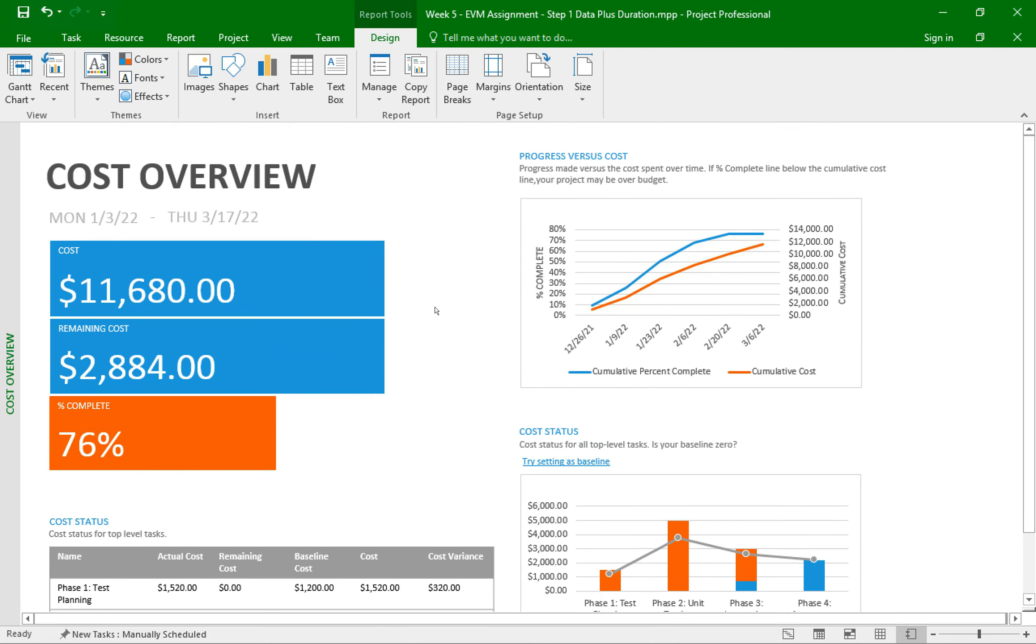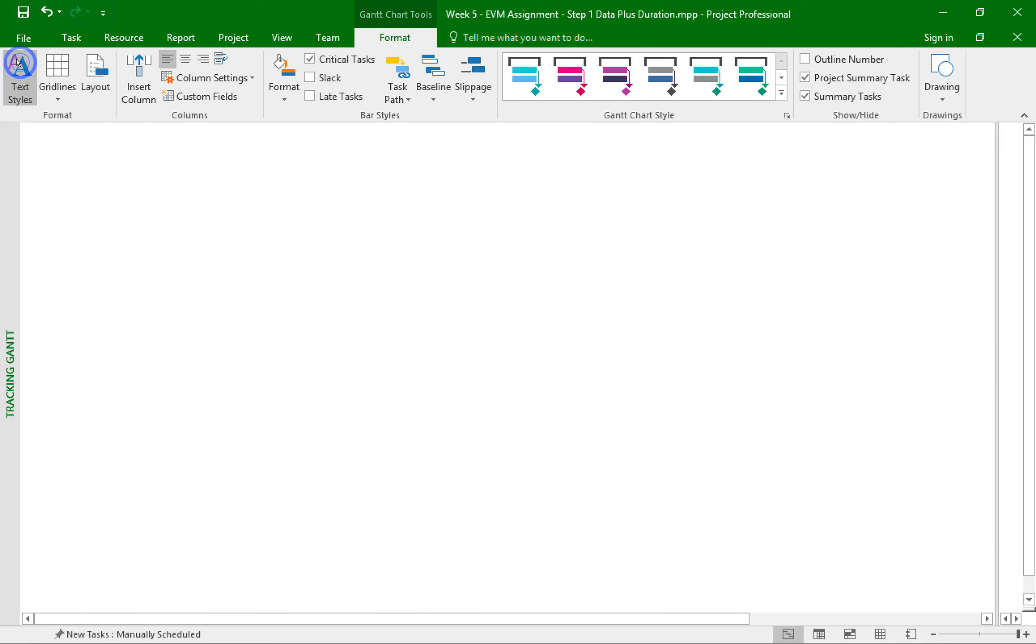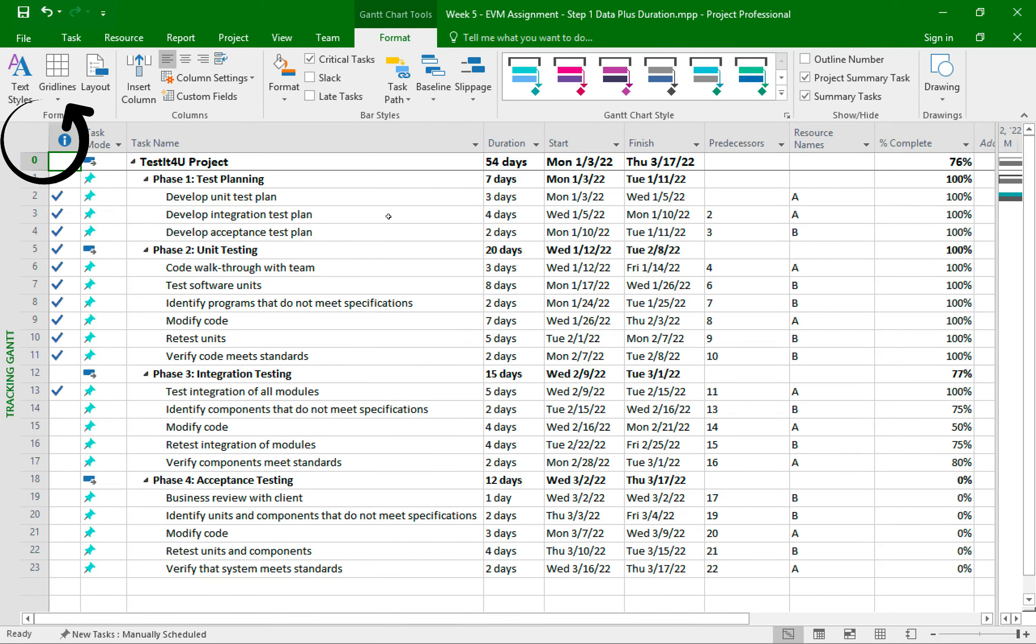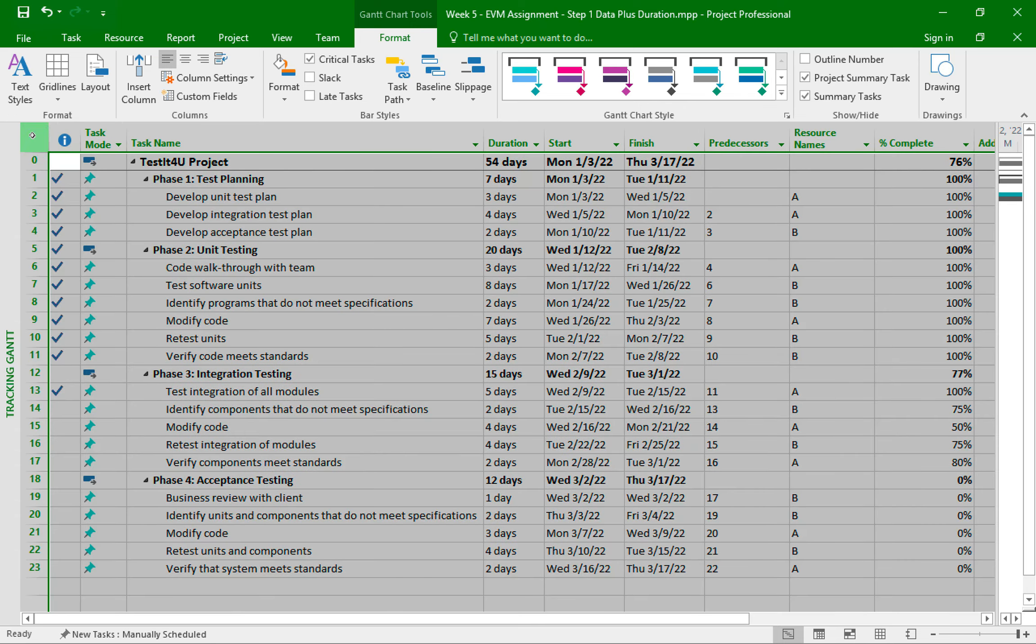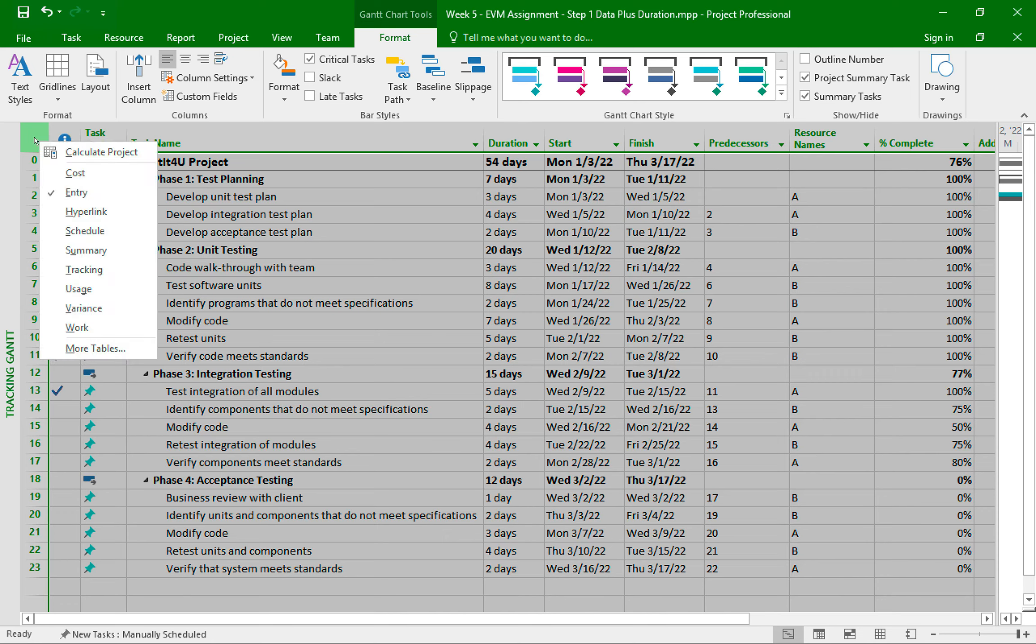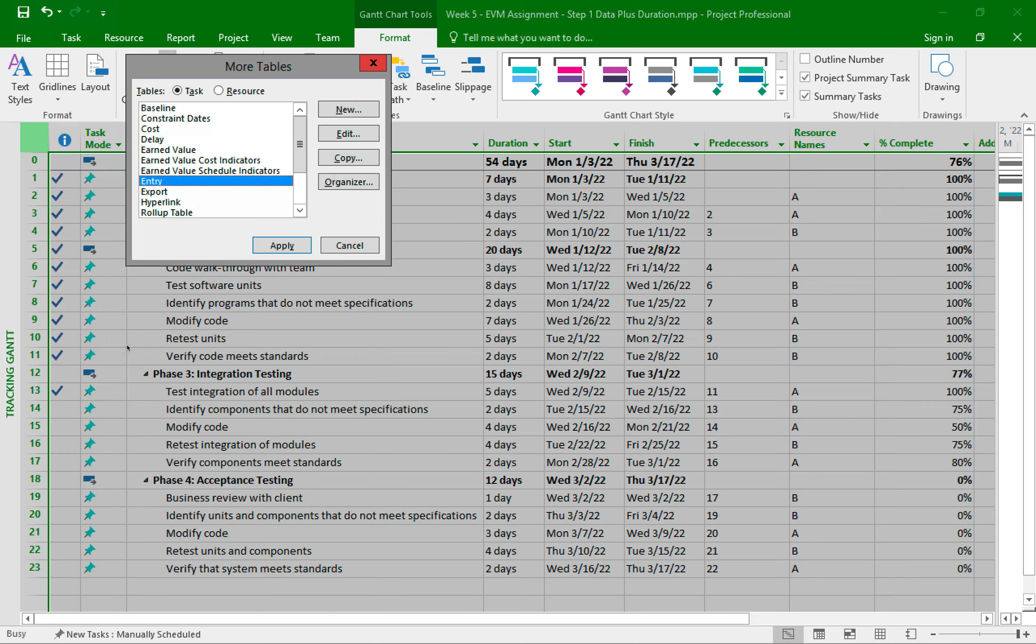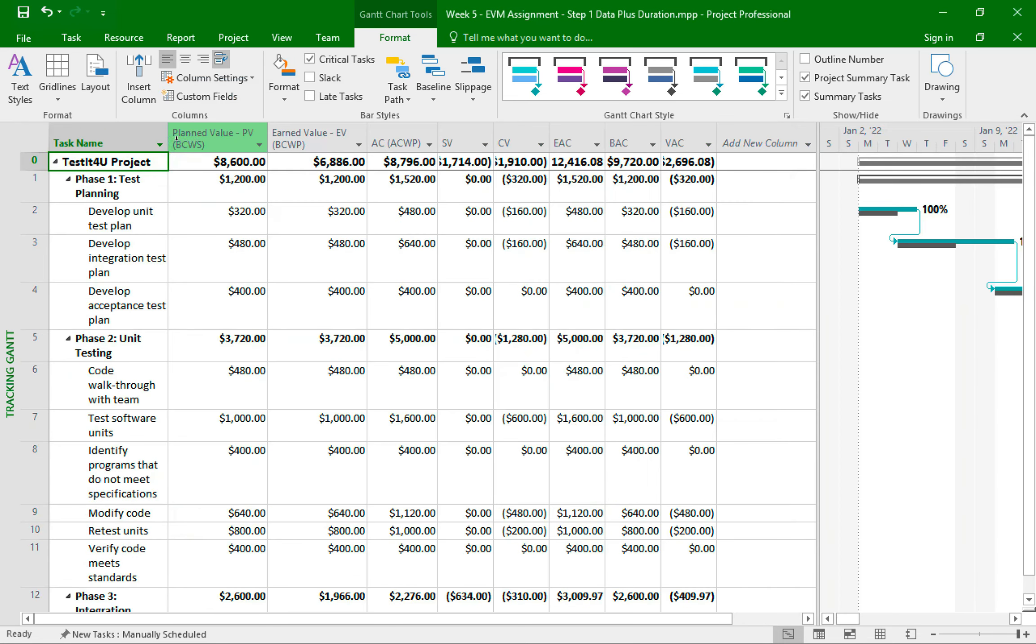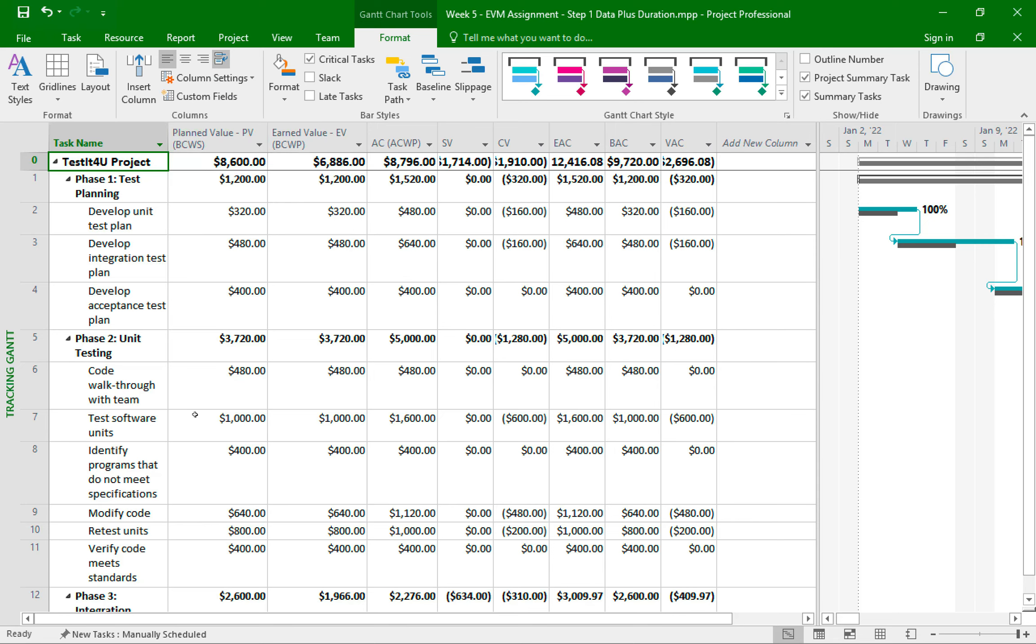And if you're interested to see where these numbers came from, at least for the earned value report, I can simply click on the Gantt chart icon. This area here is called the Select All area. And if I click on it, it selects the entire WBS area. That's why it's called Select All. But instead of selecting it, if I right-click on it, a menu of tables appear. From here, I'll click on More Tables, and then I'll double-click on Earned Value.